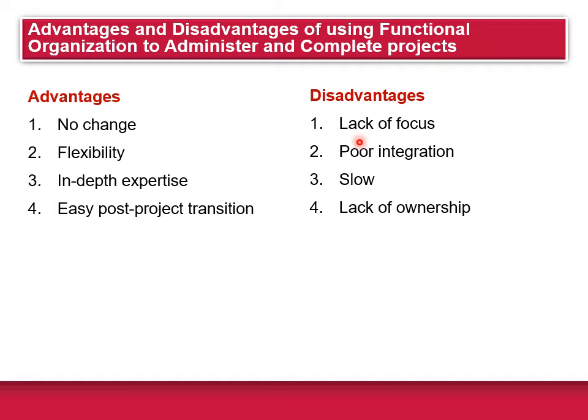The other disadvantage is poor integration across the different functional units. The different managers in each department typically tend to be concerned only with their segment, their department, and not what's best for the total overall company. The third one is it's slow. It generally takes longer to complete projects through this kind of arrangement.